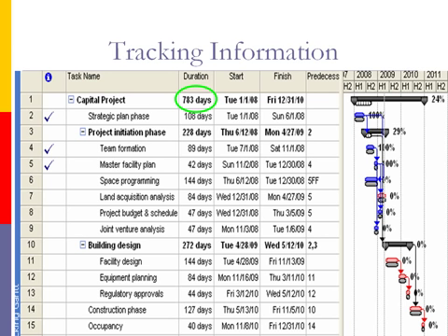In the graph, the blue line shows the actual activity, the gray line shows the baseline planned activity, and the red line shows the critical activities to be completed. The graph indicates that we are finishing tasks faster and thereby doing better than we had planned. Also, circled in green is the projected duration of the project based on performance thus far, which is 783 days.